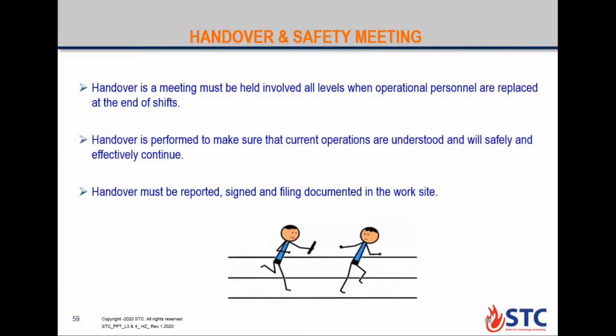In the safety meetings we need to discuss all the risks involved in the operation. Like the possibility of exceeding pressure, the possibility of gas hydrates, and also what is the emergency exit or plan in case anything unexpected happens. You also need to know the role of each crew member on location during the operation. This is also one part of the safety meeting and handover.